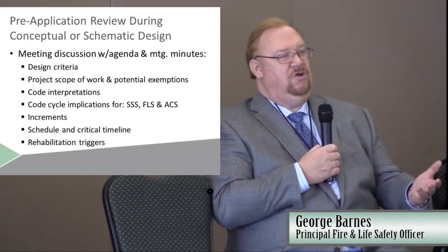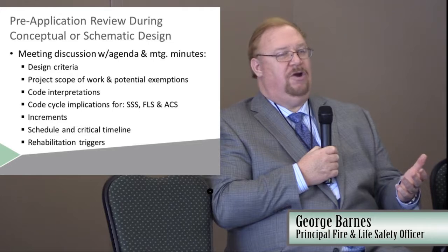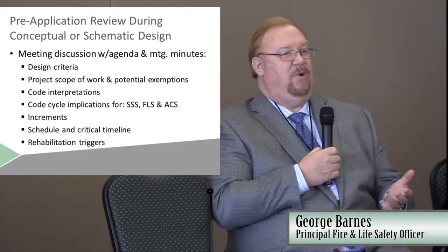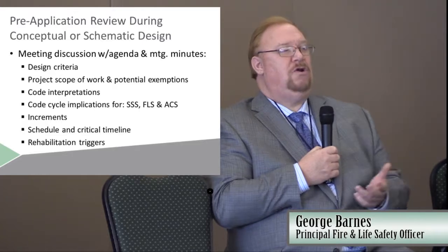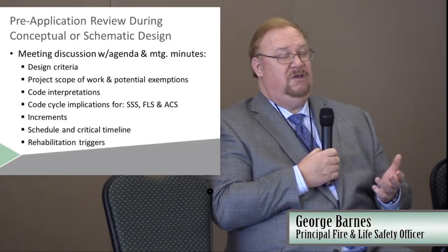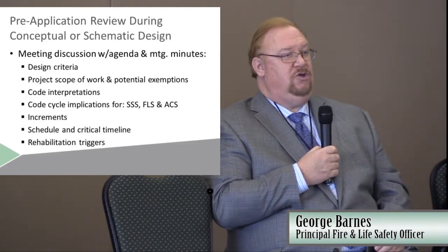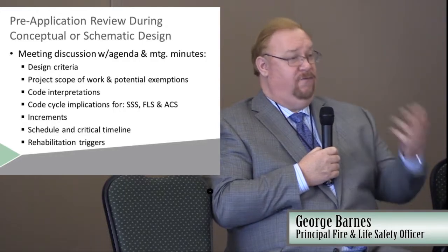So what can you do? How can you incorporate these things into your projects right now? If you are currently in design and plan on submitting prior to July 1, or you have a project that has not yet completed the back check process, you can incorporate these provisions into your design, and we have created an alternate design and materials methods request that you can submit to your regional office, and you may utilize the Building Standards Commission approval document as your justification for the change.